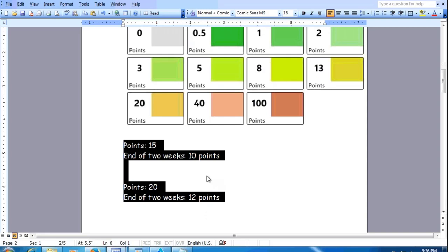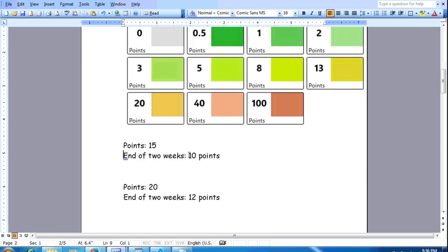On average, your team capacity is around 10 points of user stories, right? That's your team strength. That means at any point, your team can work 10 points of user stories, not more than that, not less than that. Whereas if every time you plan 20 points but accomplish 12 points, that means you're doing overestimation. The estimation is not correct.